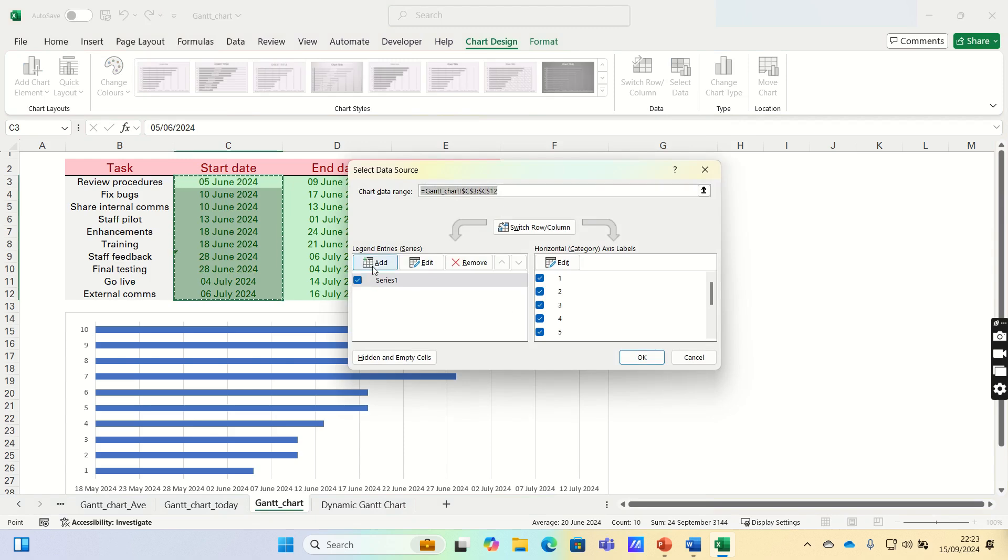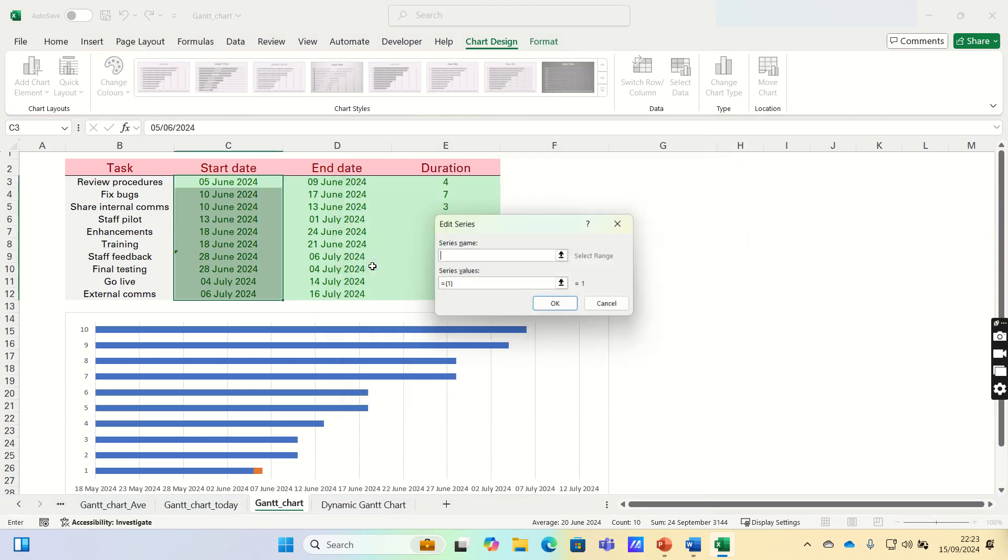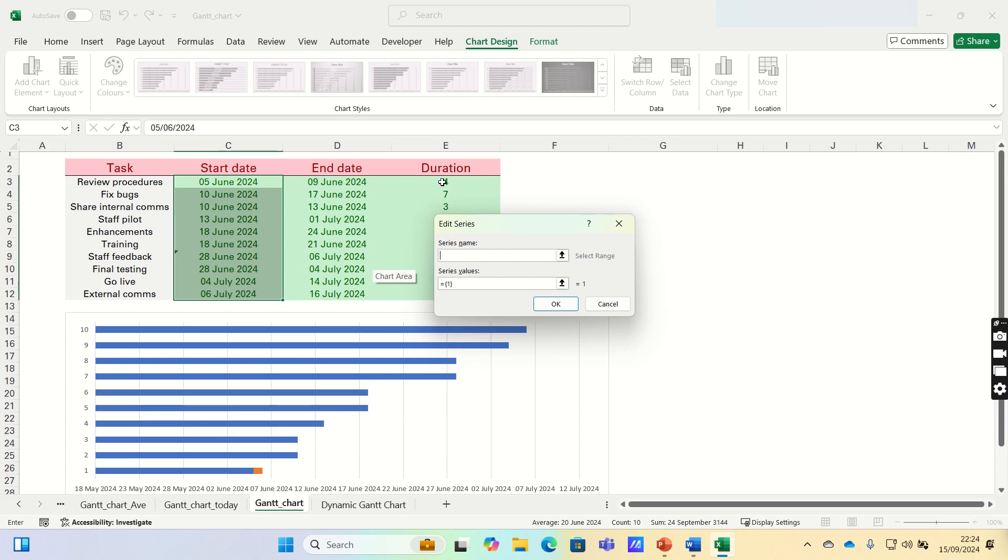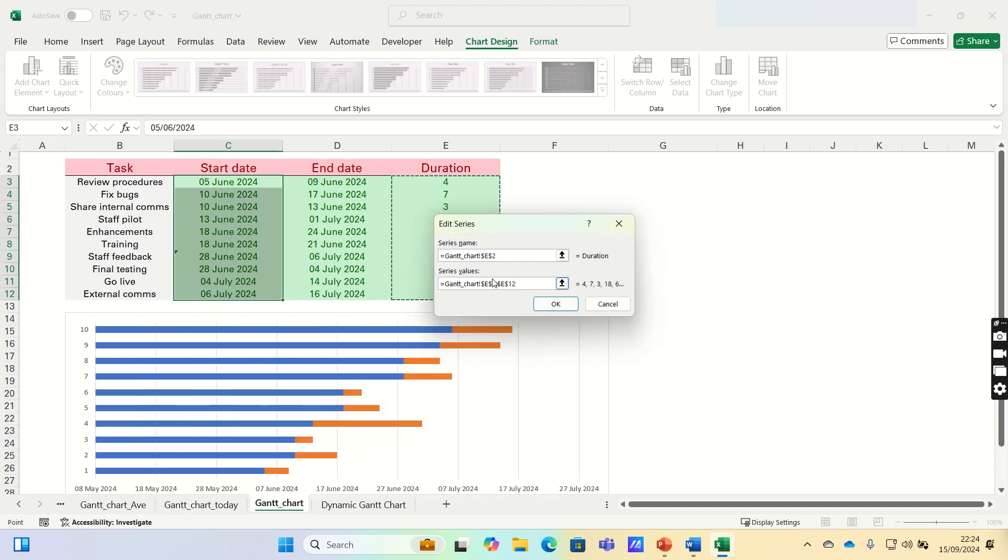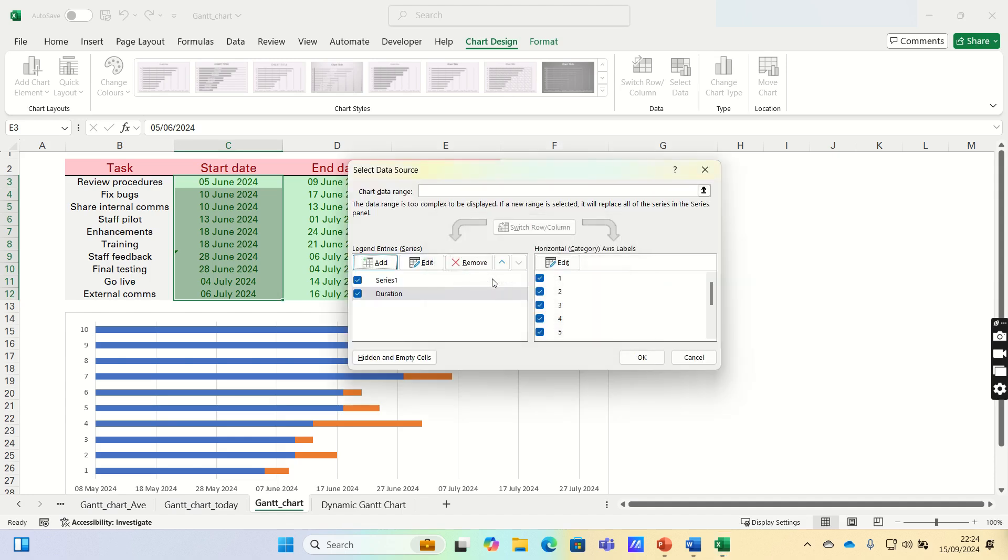Then click the Add button. The series name is Duration, which corresponds to cell E2. And for the series values, these are the values in the duration column, which are E3 to E12. Finally, we can click OK, and the bar chart will now look like this.